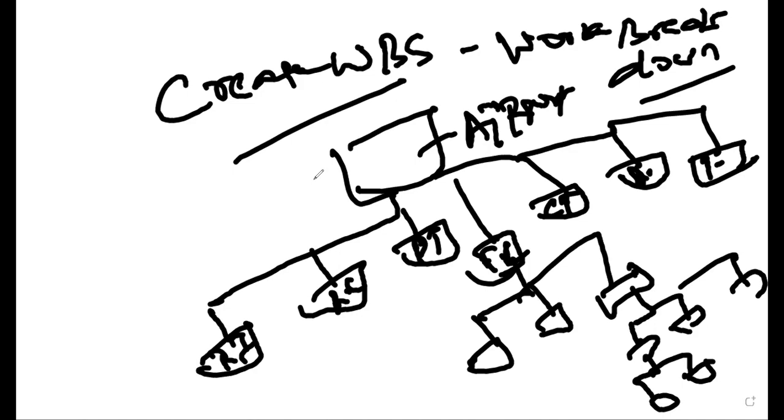And from the project charter to the scope statement, you know very well, there is a bridging process called collect requirements. Until you are able to gather the requirements, you are not able to define the scope. So once you start defining the scope, you bring the defined scope into a scope statement. That scope statement gives the information about the deliverables, detailed information about the deliverables. That deliverable you are not able to execute in a single execution. You break the deliverables into more manageable components. So the create WBS process helps you break the complete scope of the work into more manageable pieces. Is it clear or not, guys?